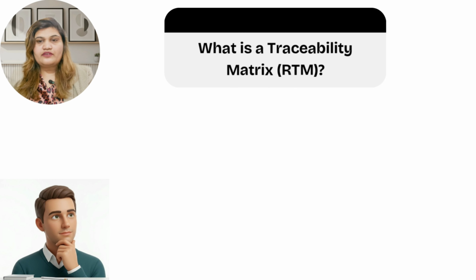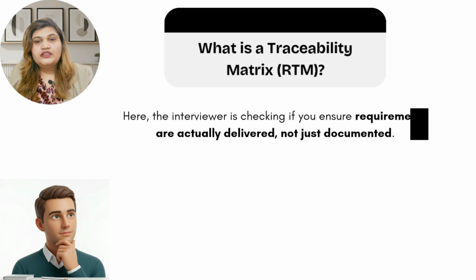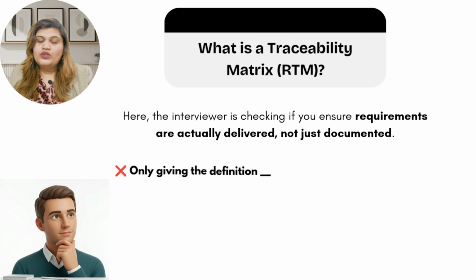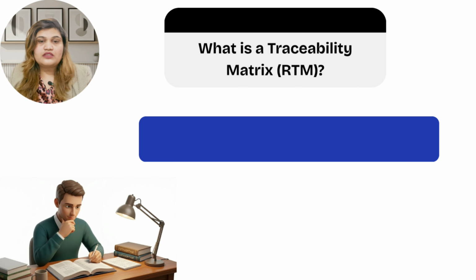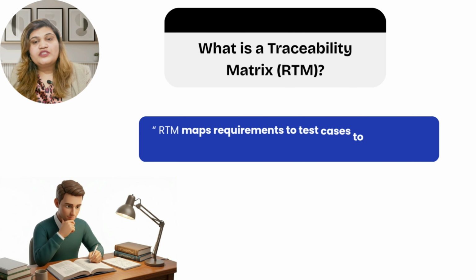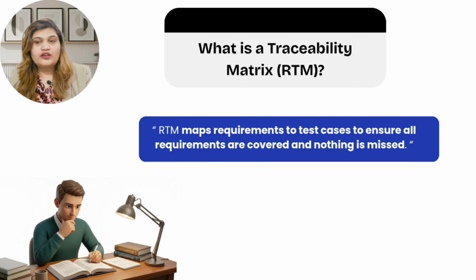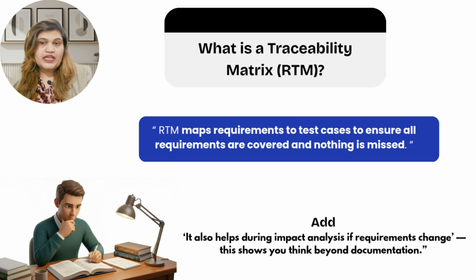What is a traceability matrix? RTM. Here, the interviewer is checking if you ensure requirements are actually delivered, not just documented. Mistakes: only giving the definition. It's a matrix without context, not mentioning its purpose. Here's the right way to answer. RTM maps requirements to test cases to ensure all requirements are covered and nothing is missed. Here's a bonus point. Add, it also helps during impact analysis if requirements change. This shows you think beyond documentation.